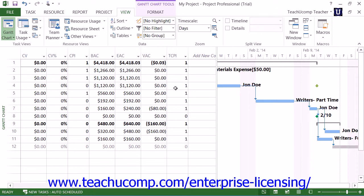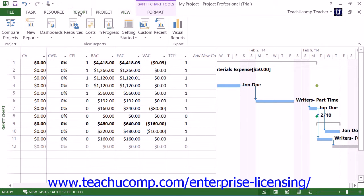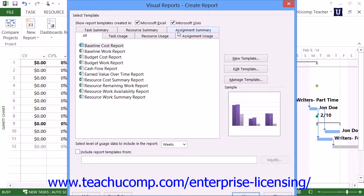For users of Microsoft Office Project 2013–2010 who also have Microsoft Excel installed, you can create a visual Earned Value Over Time report. This is one of the many Excel reports available within Project, and it shows a standard S-Curve line tracing the cumulative value of three key indicators over time: the actual cost of work performed, the budgeted cost of work scheduled, and the budgeted cost of work performed. To create this report in Project 2013, click the Visual Reports button in the Export button group on the Report tab in the ribbon. In Project 2010, click the Visual Reports button within the Reports button group on the Project tab.